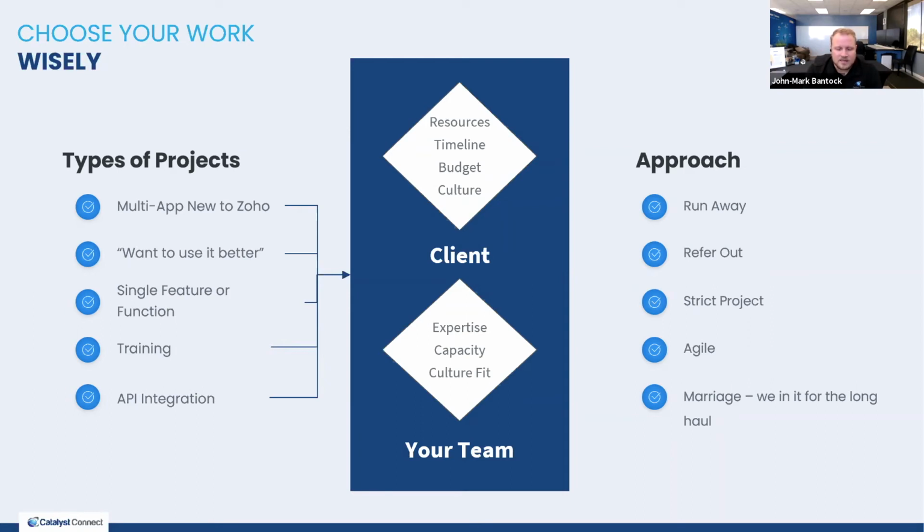Because as clients get into Zoho and learn more about what it can do, there are so many ideas that fly around, like, oh, well, let's just implement this. And it's so tempting to take that extra couple hours to dip into that rabbit hole. But ultimately, it really complicates that phase 1, and can lead to timeline overruns and budget overruns, and those little hours here or there add up.